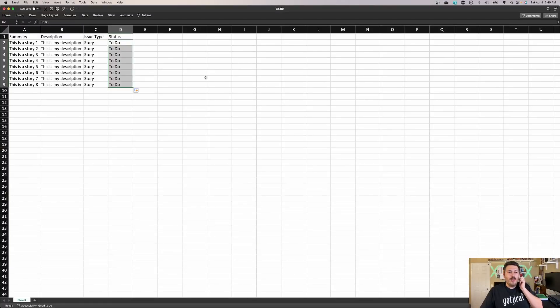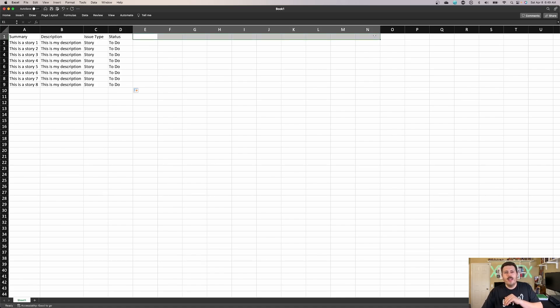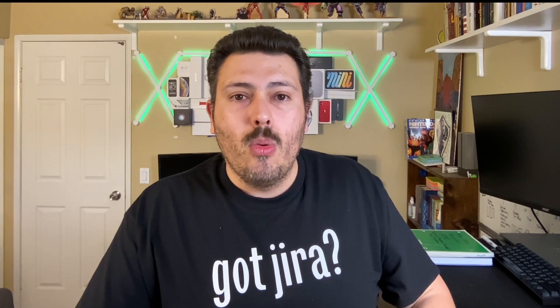I wanted to do a very beginner's guide — here's how you get the bare bones minimum. It's actually not that bad as long as you're not doing assignees, dates, or linking. Once you have this file set up with eight unique stories, some descriptions, the issue type, and the status, you can also add other columns like components, fixed versions, priorities, whatever you want. If you omit them, whatever the defaults are in your Jira project — that's what will be created.